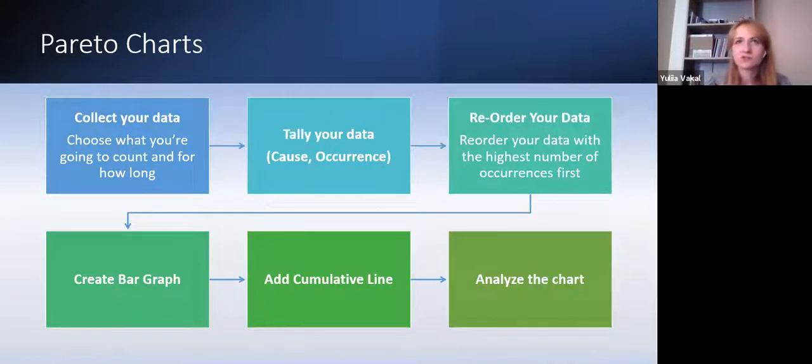So that's the process of building Pareto charts or doing the analysis. This process is tailored to Pareto charts, but it's general as well. First, we need to understand and state the clear problem. Then we need to collect our data. That's the most important step in this analysis.